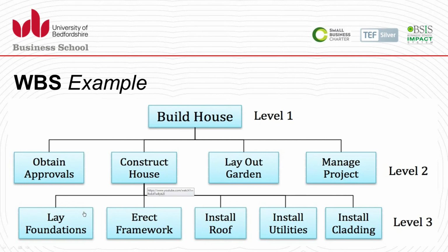So the construction, a key milestone as a deliverable, can be further subdivided. It becomes like a mini project within the project, whether it is given to a contractor to do the construction, or done in-house or outsourced. We know this will be further subdivided or decomposed: foundation work, then the erection, the framework, the civil work, roofing, and then any utilities to be installed, and for example the cladding installation. So this is level 1 to level 2 to level 3. Each milestone can be further decomposed, with further breakdown going to the bottom to include the complete list of activities, main activities and sub-activities.